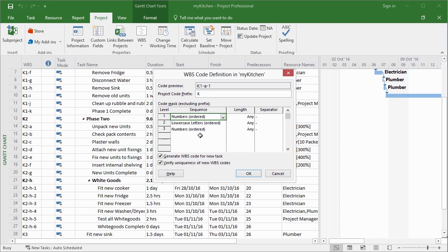All the tasks sit at the top level to start with. As soon as you start adding project summary tasks and indenting, you'll get a second level. Further indenting causes a third, and further indenting a fourth level, etc. Don't worry about running out of indentations. There's plenty of rows in here to put all those levels in. You then choose a prefix if you want one.